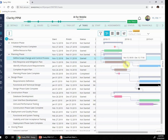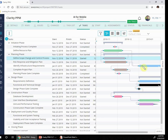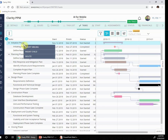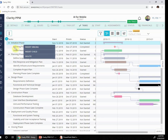To build a relationship, I can hover over towards the end of a task and then drag the dependency line and drop it wherever I want to build a relationship. In this example, I'm building a finish-to-start relationship from the end of one task to the start of the next. To create a new task, I can use the plus icon or do a right mouse click and use the new menu. By right-clicking on a summary task, I see three options: insert a sibling at the same level, insert a child task underneath, or delete the task.